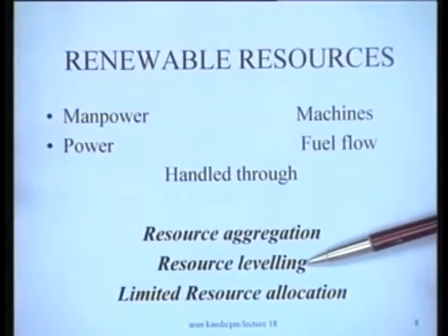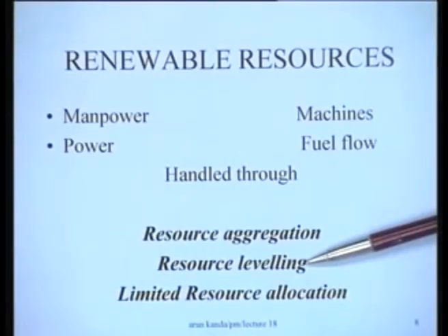On the other hand, resource leveling is more detailed in the sense that it looks at the resource profile, and you might not find the resource profile very satisfactory. So it might want to change the schedule to get a better, more acceptable resource profile. So essentially that is the process of resource leveling, and limited resource allocation is the process of trying to conform to resource availabilities and trying to minimize the project duration. So let's look at these things in a little greater detail.